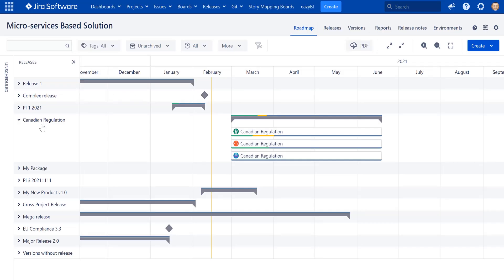Looking at the Canadian Regulation example, we can see the start and release date of the entire release, as well as the start and release date of each version belonging to it. Green, amber, and blue lines indicate actual progress — comparing actual progress with today's marker shows whether your release and versions are behind schedule, ahead, or on track. This view is not only for representation — you can use it to plan your releases.